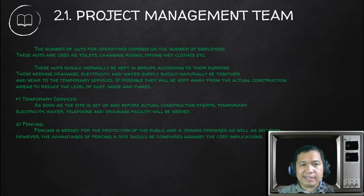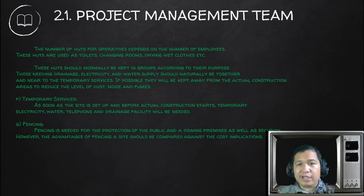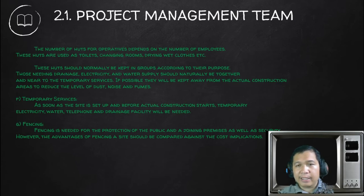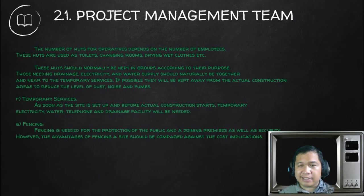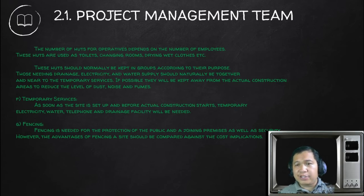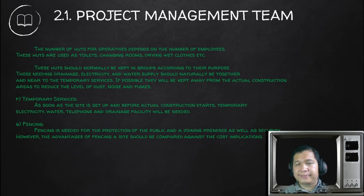Regarding temporary services: as soon as the site is set up and before actual construction starts, temporary electricity, water, telephone, and drainage facilities should be established. Fencing is needed for the protection of the public and adjoining premises — that's security. It is much better to fence your site because it would be costlier if you have a liability issue from an uninvited visitor who accidentally gets injured. Fencing also helps you secure your materials and avoid lawsuits, especially if you are constructing something near the city or areas with a lot of population.